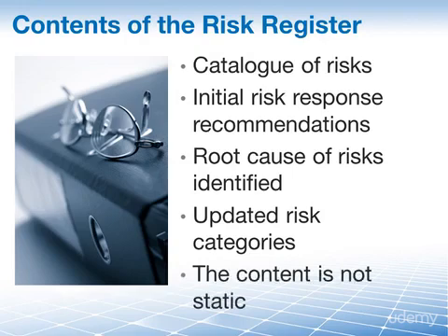A final and important point to make is that in this phase of project risk management, the risk register contains only the start of what will be a lot more content. The output of the risk analysis process will be added, as will the output of the plan risk response process. What would you guess is used to monitor and control risks? Yep, the risk register. Through iterations of each of these processes, identify, analyze, plan responses, and control and monitor the risk, the register will grow larger and larger and become more and more valuable, both to this project and future projects.